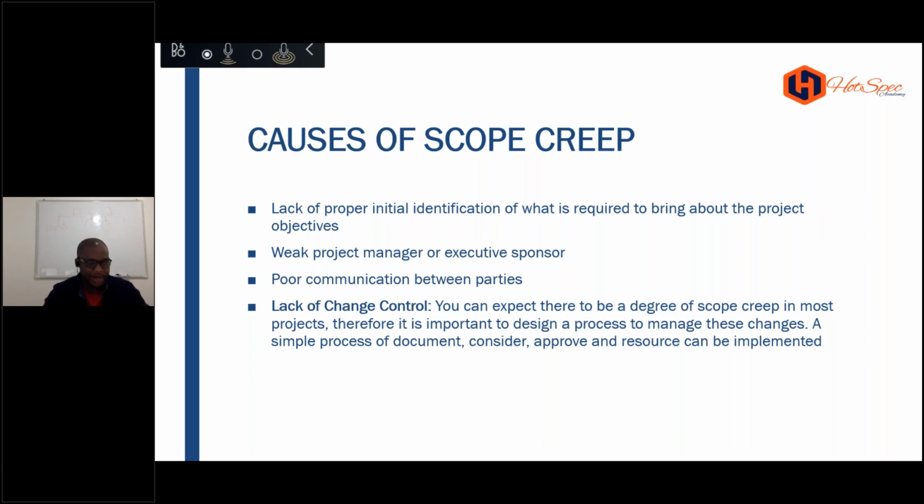Now, you don't circulate it yourself. That's the point where project management comes in, your project support or the PMO analyst does that for you. They govern the structure of the project, the documentation, the standards. They release the new version. You update it, you send it to them. They circulate it, so they capture all the feedback. They revert back to you as a PM, as a BA.